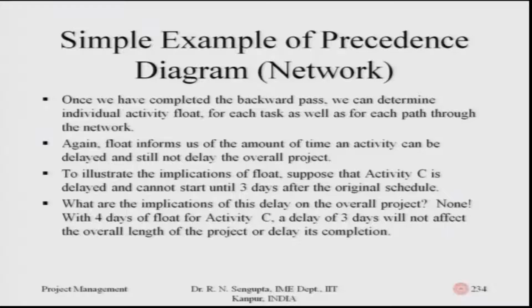So, if we consider these implications, the delay to the total duration of the project in many cases can be 0, in the sense there would be some slacks for which the delay is admissible, such that any shifting of an activity or a job can be done. With 4 days of float for activity C, a delay of 3 days will not affect the overall length of the project. If you go back to the last slide, which again I am mentioning is the 233rd slide, you will understand that is true.